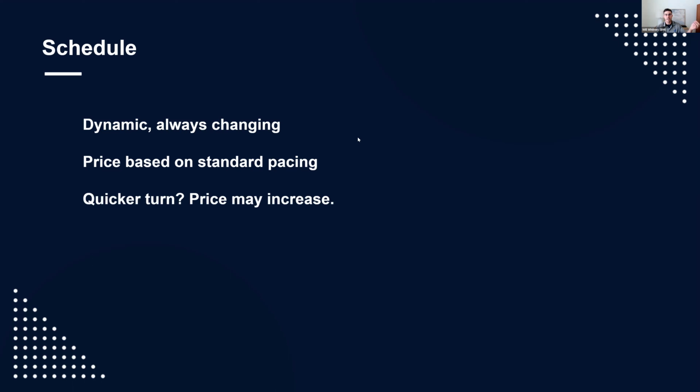If you need a specific turnaround, though, you can let us know, and we will incorporate that into the scope of work, and whether that's going to change the price or not. A good example, it wasn't from paper scanning, but it was a large microfiche scanning project we just finished last month. We had a project, 400,000 microfiche sheets, and we were working with the client. We said, here's your price based on a 9-month project. They said, okay. Came back about a month later, said, we are required to get this done in 2 months. So we said, okay. We were able to do it. We had to adjust and increase their price to accommodate that.